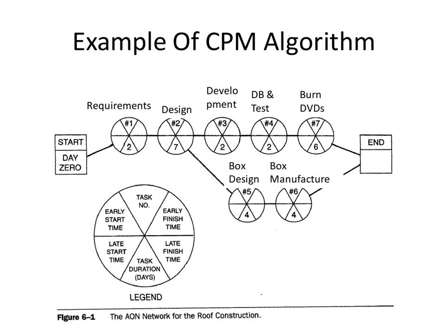That's it. Now, meanwhile, this lower path, you could burn 2 days when you start task number 5, and it's still going to be okay. You could start it as early as 9. It's ready to start, but you could start it at 11 and still finish in time. Does that make sense? Yes, Alex.